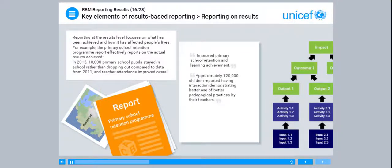Reporting at the results level focuses on what has been achieved and how it has affected people's lives. For example, the Primary School Retention Programme report effectively reports on the actual results achieved: in 2015, 10,000 primary school pupils stayed in school rather than dropping out compared to data from 2011, and teacher attendance improved overall.